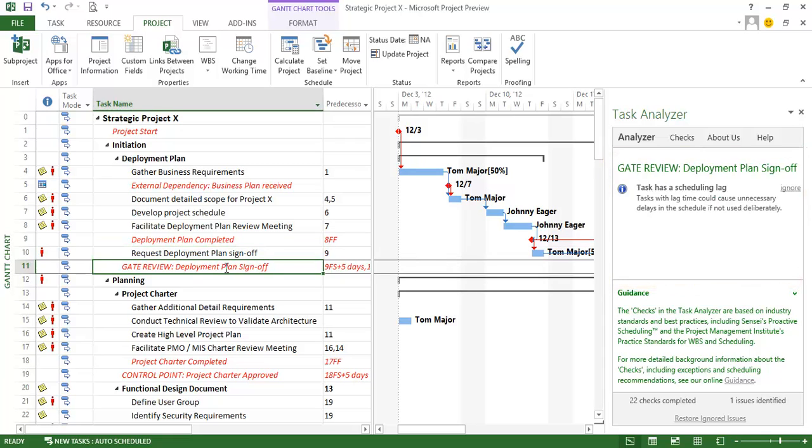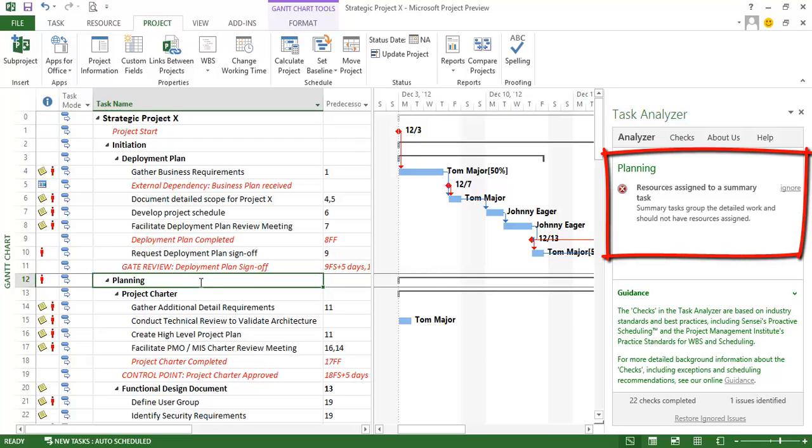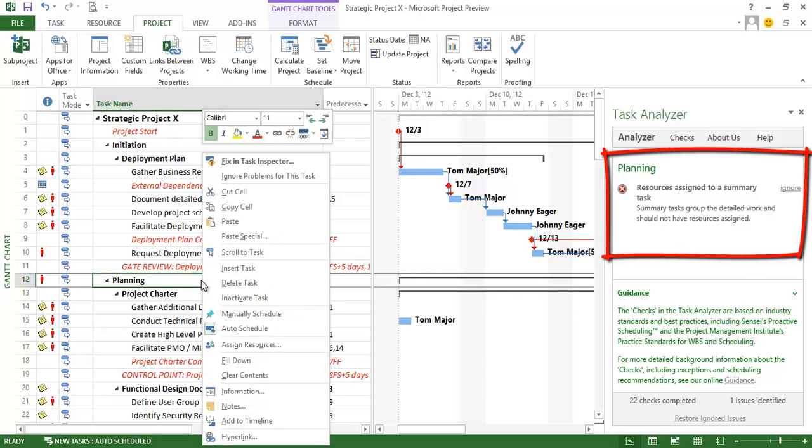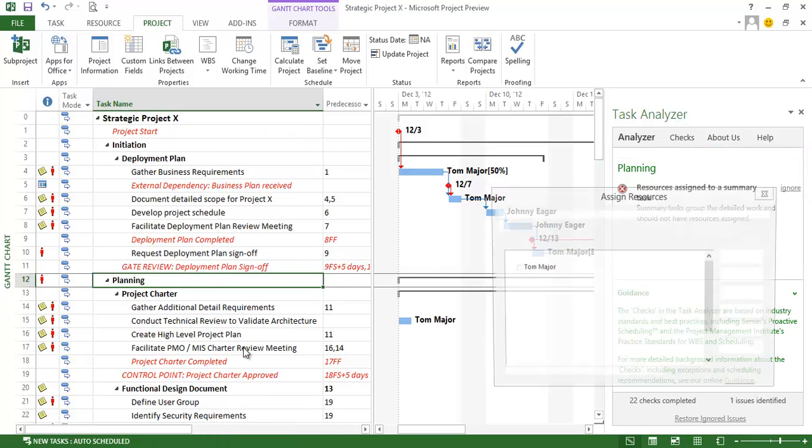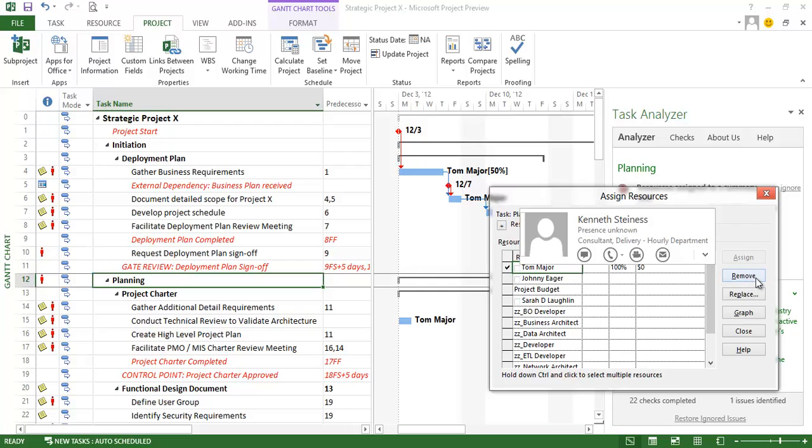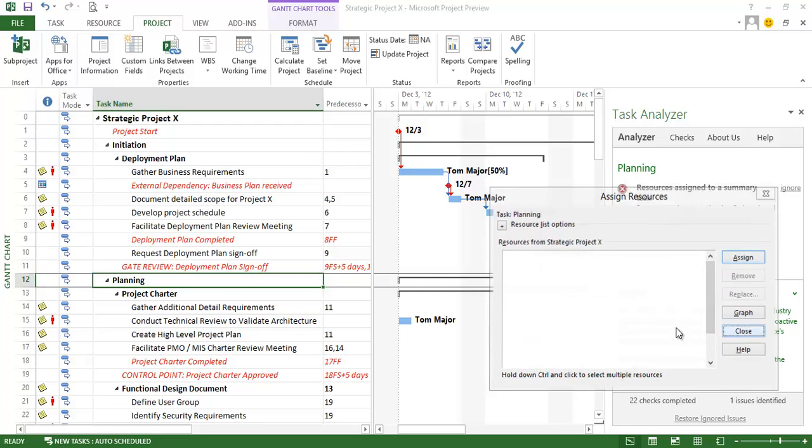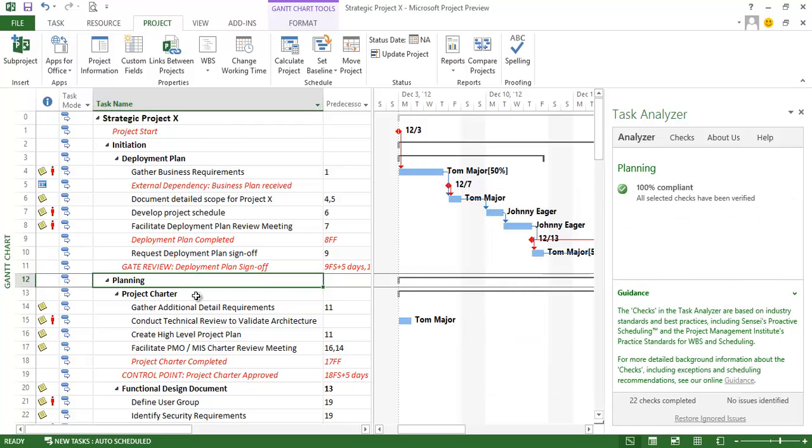Again this is the same scheduling lag that we saw earlier and this is deliberate so that one is good. Moving on to the next line item here I have a resource assigned to a summary task. And this is because when I originally built my schedule this was a detailed task that I promoted to a summary task. So let me go ahead and get rid of this one. This is obviously not right. Because as we know we shouldn't have resources assigned to summary tasks.